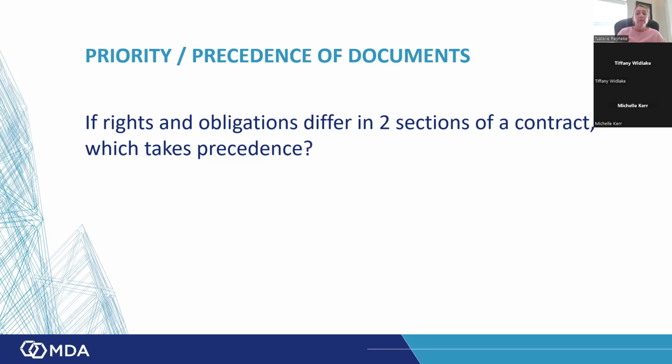So yeah, be very aware of that clause. And basically, when you see priority or precedence of documents, that's what it means. The higher in the list, the more important it is. Okay. Remember as well that this only occurs when there is actually a discrepancy between the documents. If there's no discrepancy between the documents, then obviously you're not going to have to use this clause.